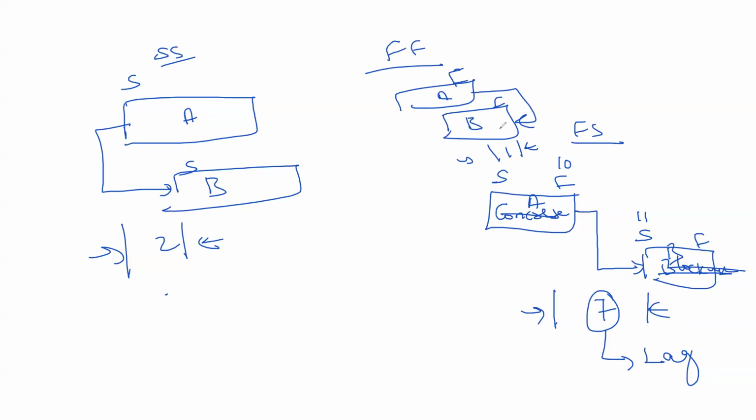In the last class, when we discussed, we have 4 activities, A, B, C, D, right? A will take 10 days, B will take 5 days, C will take whatever it is. So what is the duration of this? Let's say D will take 15 days. So some of you mentioned it could be 15 to 40. But after finishing an activity, there can be a lag. Waiting time is known as lag. So the duration of the project can be even more than 40 days.